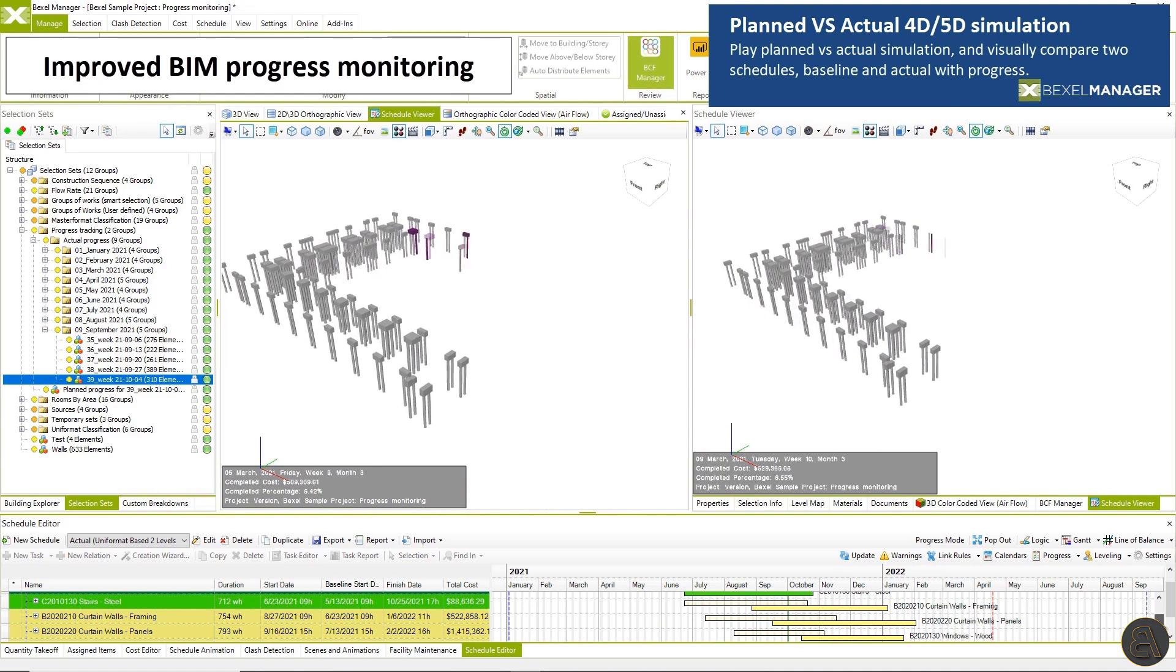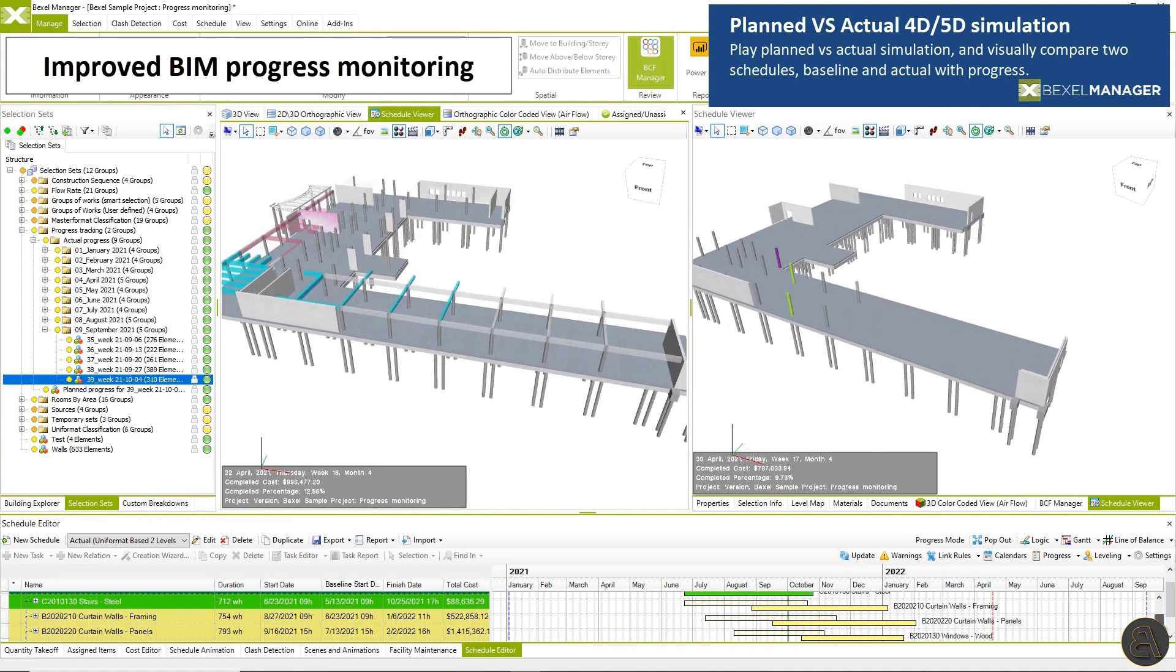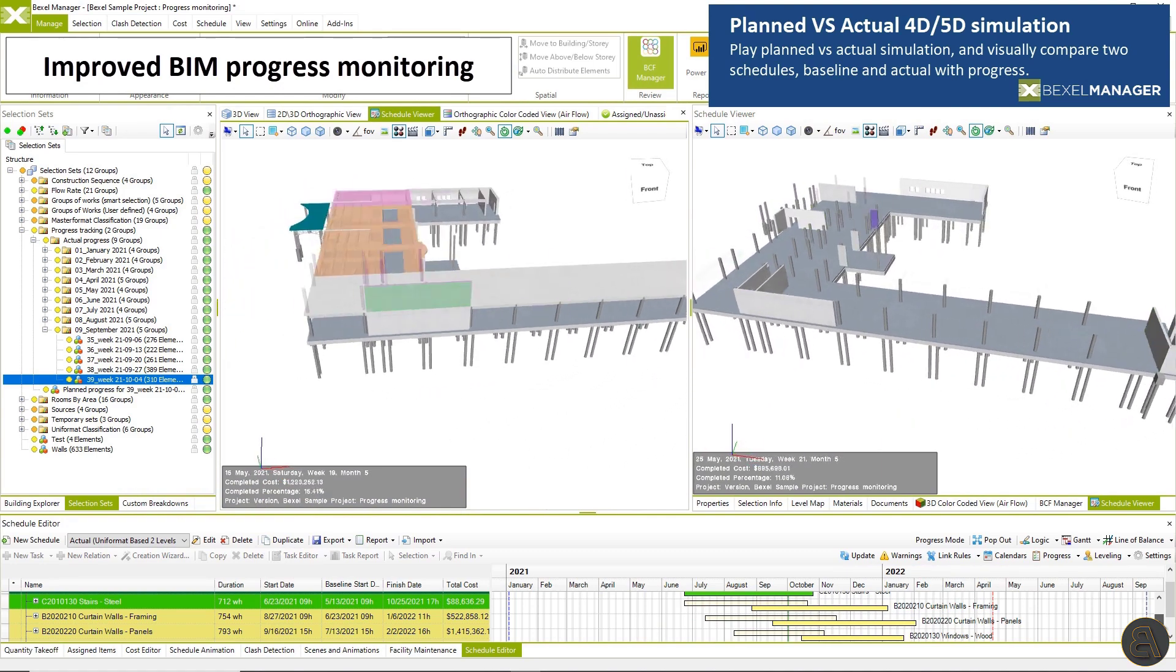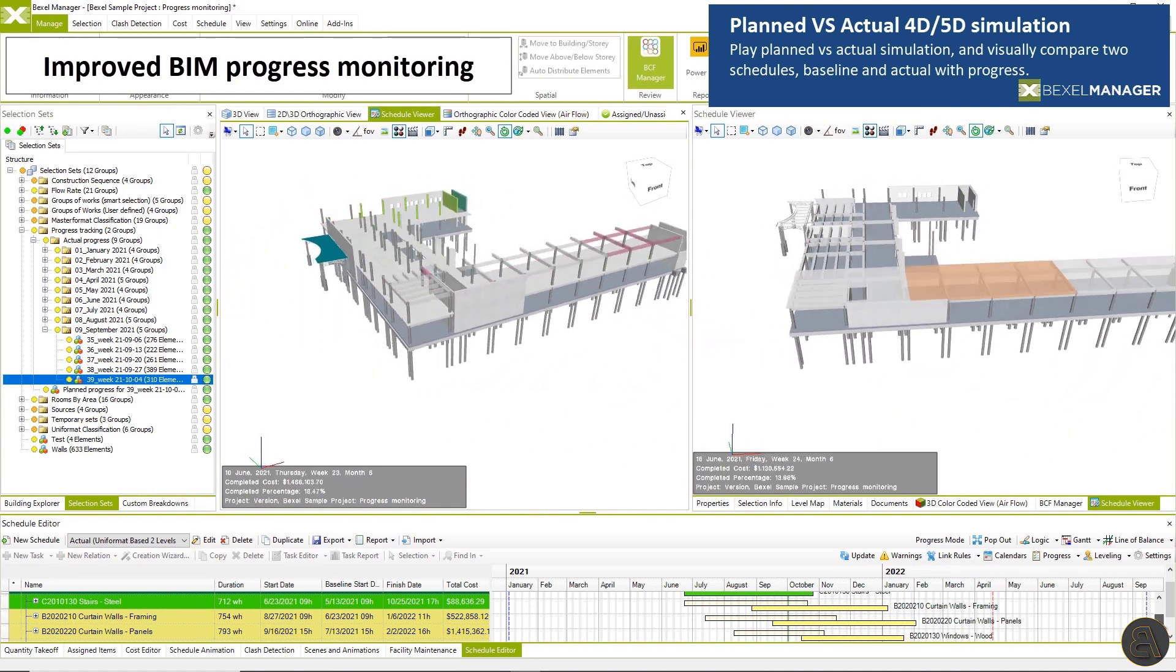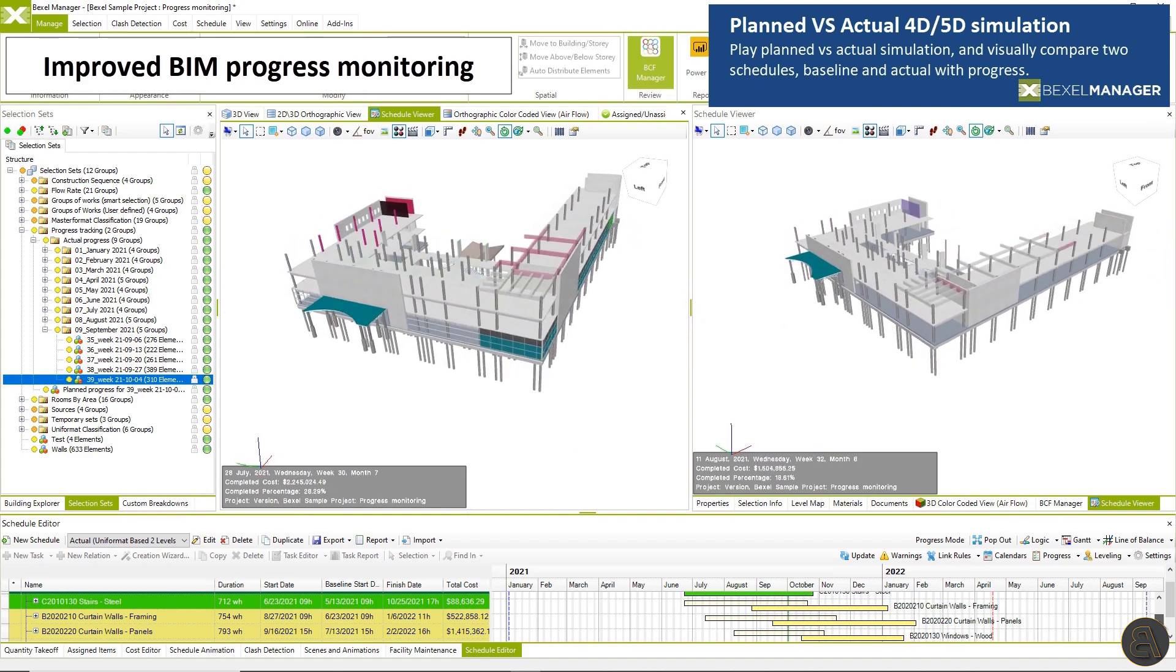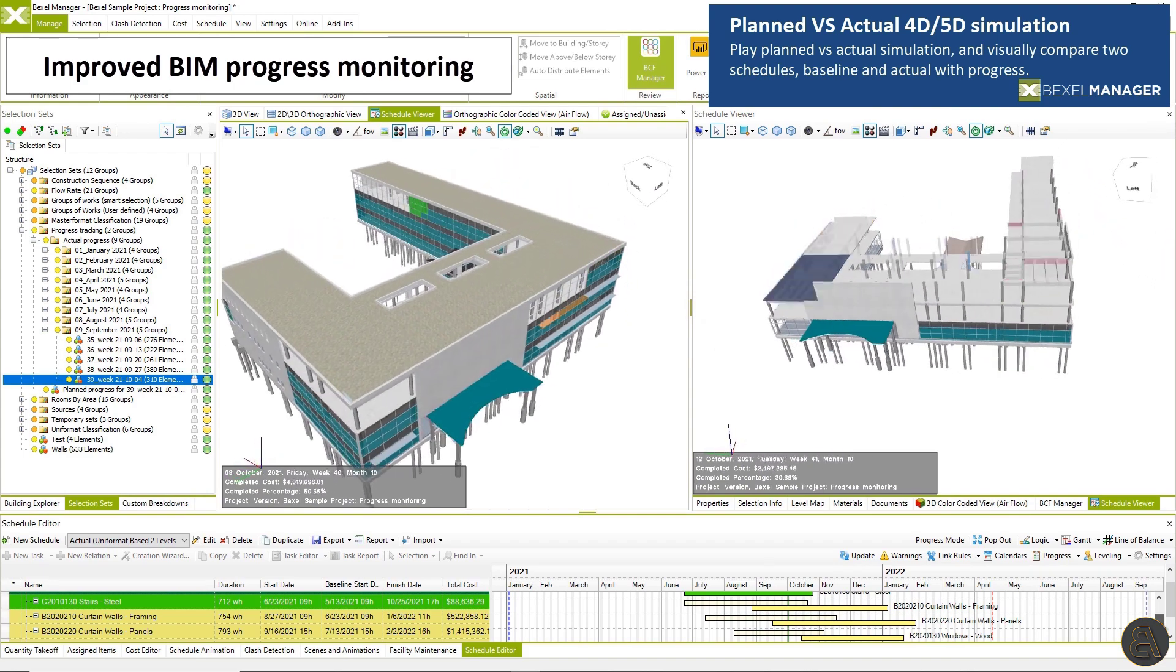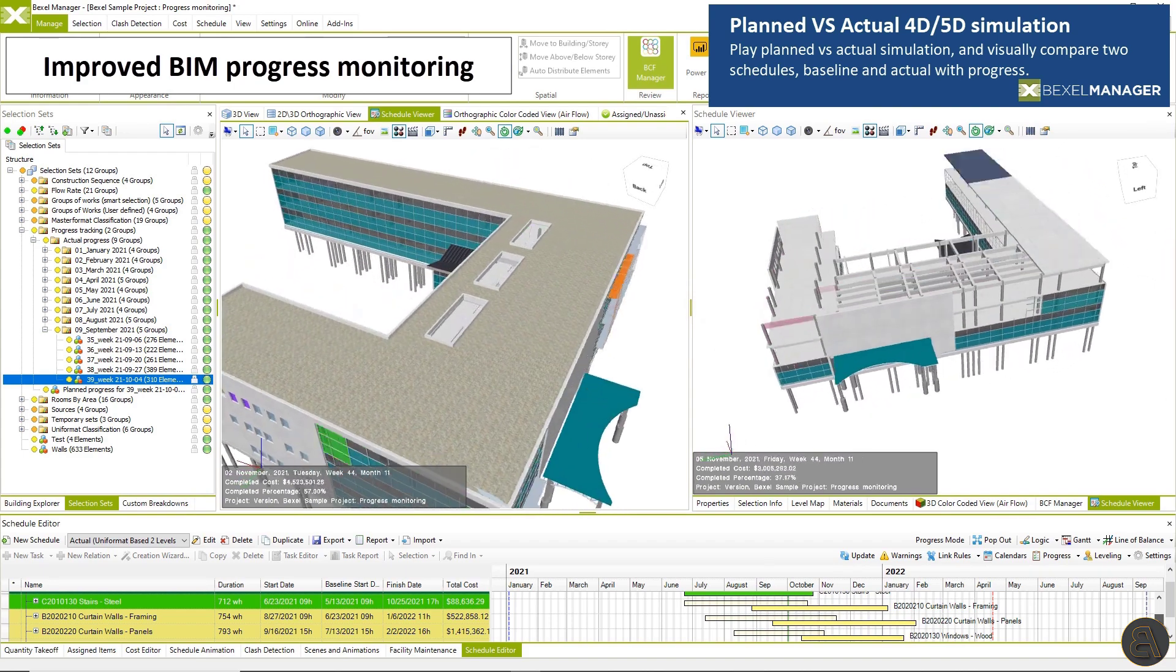After entering the progress, play planned versus actual simulation and visually compare to schedule baseline and actual with progress.